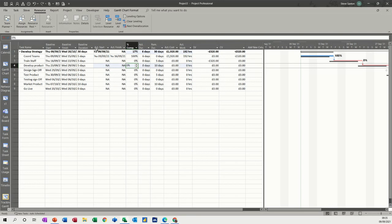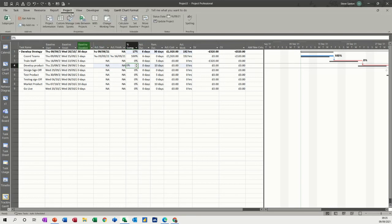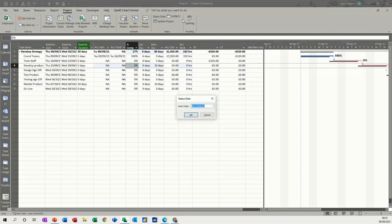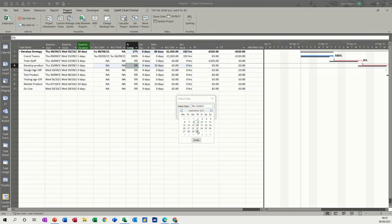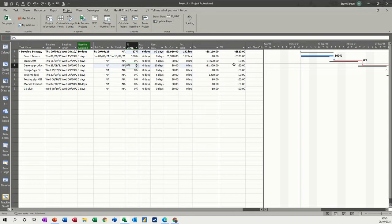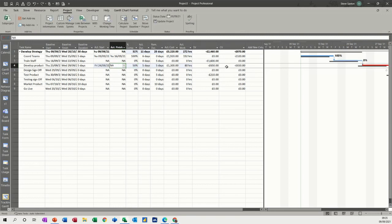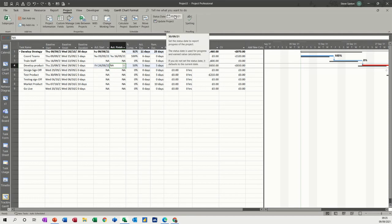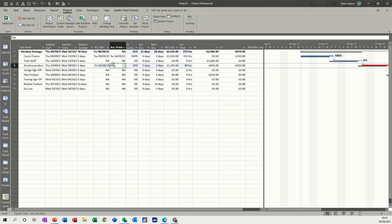Why is nothing happening? Because the status date is not past that date, so we need to change that. Go back to Project, status date, put that forward to the 30th. Then you can see the cost coming up there. The status date is quite key - if you forget to change the status dates, you're just going to get a zero no matter what happens.